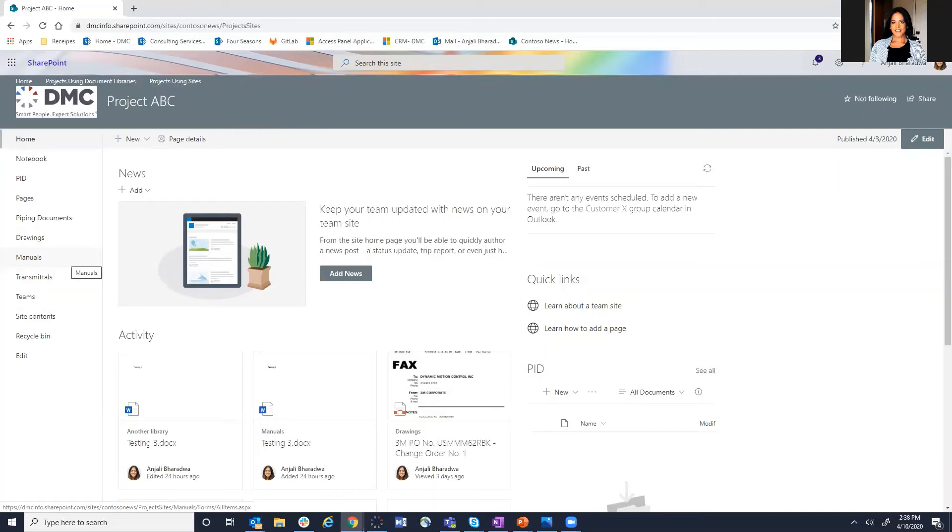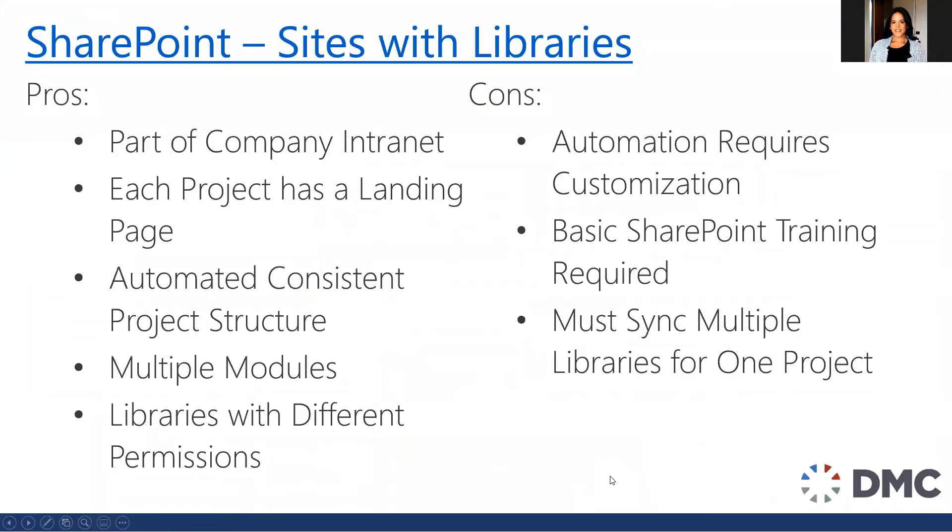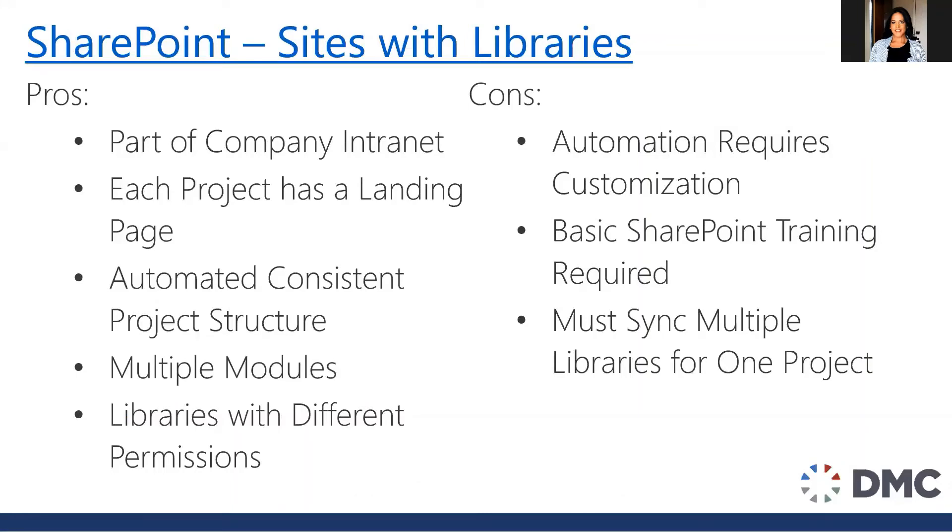So let's go back and review the pros and cons to using a project site for a project. Now specifically when we're talking about libraries, again it's part of the company Intranet, we talked about that. The project has a landing page. You have the ability to do this in a manual process. However, if you automate it, you get this consistent project structure every time you create a new project. So therefore when you have new people come in to a project that might already be going, you don't have to kind of train them and they don't have to dig around to see where is that information that they're looking for. So the consistent project structure is really key. You have the ability to add multiple modules like we talked about tasks, issues, different libraries, quick links, calendars, things like that. And one of the key reasons to why you would differentiate into different document libraries instead of just one is that you have the ability to create different permissions. So if there's a department in your group that would have access to one document or maybe read only, but they would have the ability to fully contribute to another, this might be a good option to separate them by document libraries.